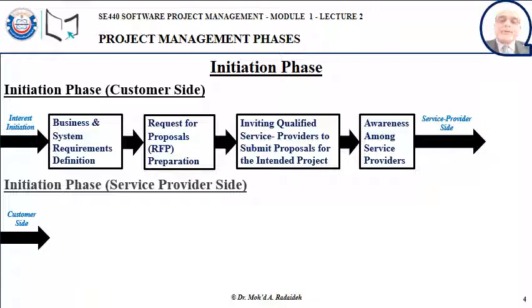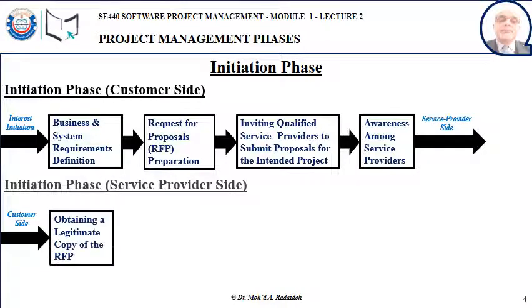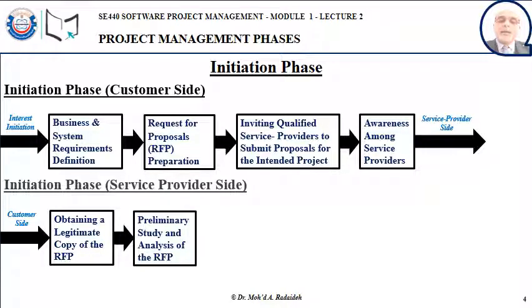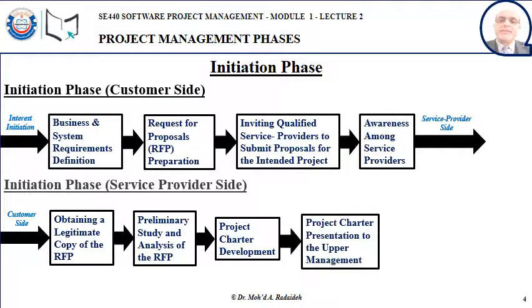From there, we move to the service provider side. The service provider would attempt to obtain a legitimate copy of the RFP from the customer. The service provider would conduct a high-level study and analysis of the RFP to define or to extract the requirements, the terms of conditions, etc., into a project charter, which is an executive summary of the project opportunity.